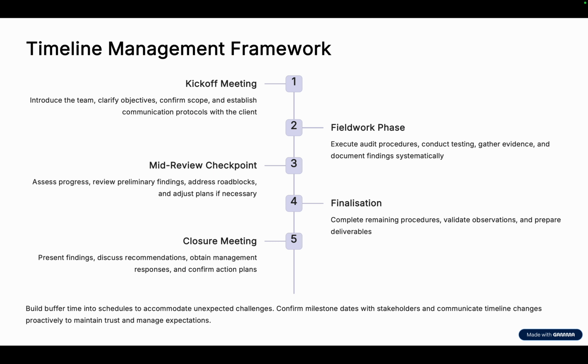The timeline we need to broadly cover in our audit cycle starts with the kickoff meeting. Post kickoff meeting, we need to get our field work done, and while doing our field work we need to get our mid review. Someone from the office, might be your GTL or your reporting manager, or someone else, can review your work, assess it, and may suggest something if there is any requirement.